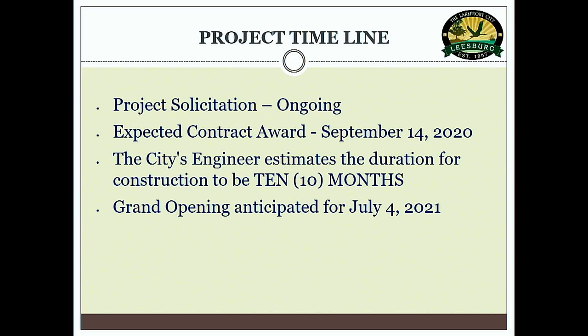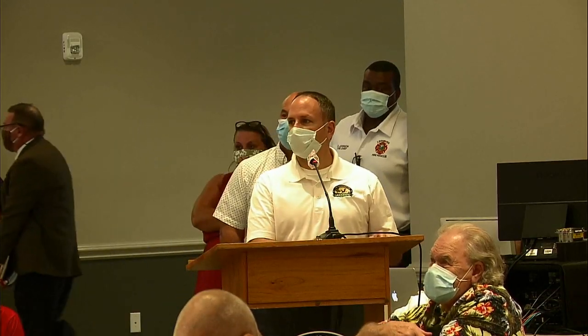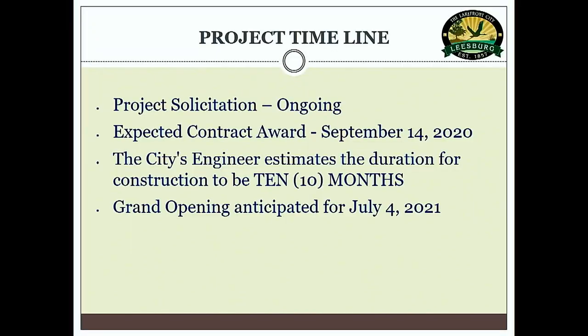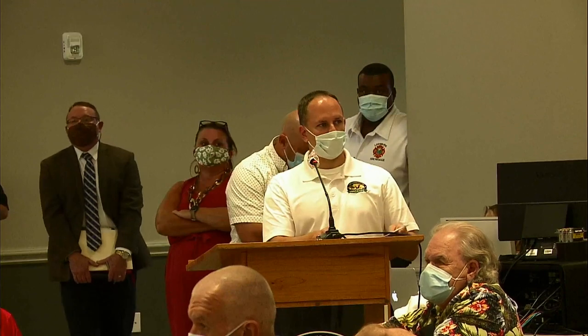All right, then just a brief on the project timeline. As the city manager mentioned, right now we are in solicitation and we're expecting contract award on September 14th. We have bid openings on September 1st, and that will be our next available commission meeting to take it up for review. Our design engineer is anticipating 10 months of construction, and we're shooting to open it up for July 4th, 2021. Any questions?